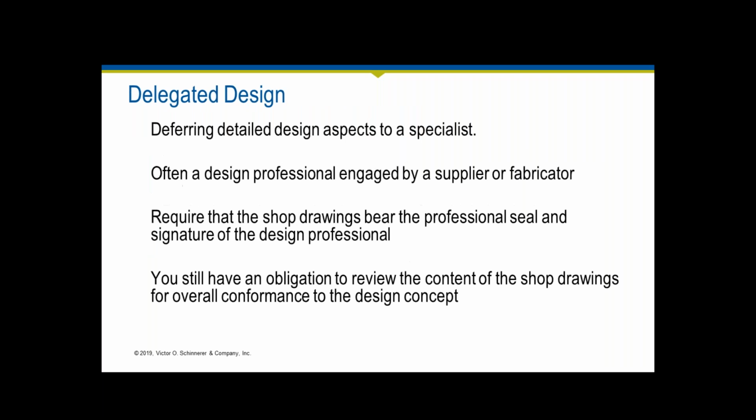The other thing that I want to briefly touch on is delegated design. In some cases, you may give the contractor design responsibility for a specialty scope of the work. It's often another design professional who's engaged by a supplier or a fabricator. For this to work, of course, you have to specify all of the performance or design criteria that must be satisfied. And you're still required to review and approve the contractor's submittal for conformance with the design concept. Delegated design is often used for things like shoring and other items during the construction phase that require somebody to take it to the next step and have a design professional review.